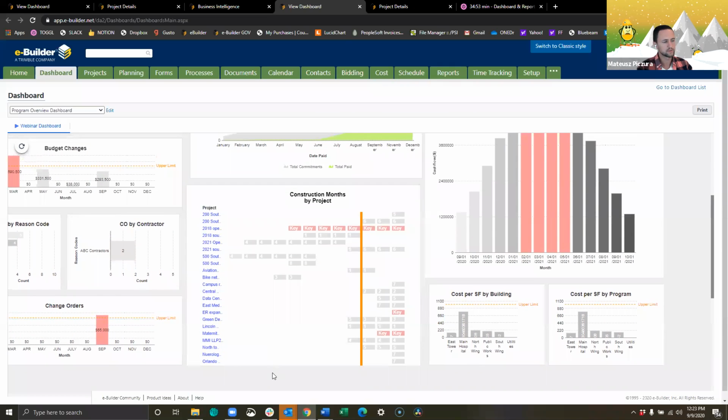So for this visual, what we decided to do is list all of the projects and only show their construction tasks. So when is construction happening for each month? Construction tends to be the biggest task, and one potentially where if you impact it, it might be the one that is going to cost the most money. So if I am looking at cash flows and I know for next year I need to flatten my curve for February, March, April, and May, looking at the schedule, I can at a glance see which projects or where construction hasn't started for projects.